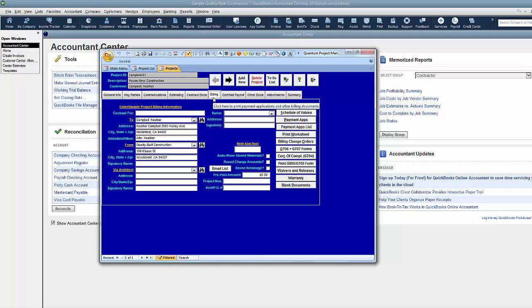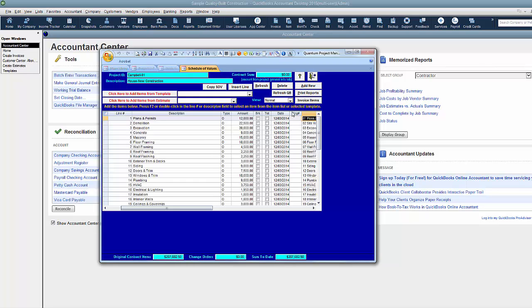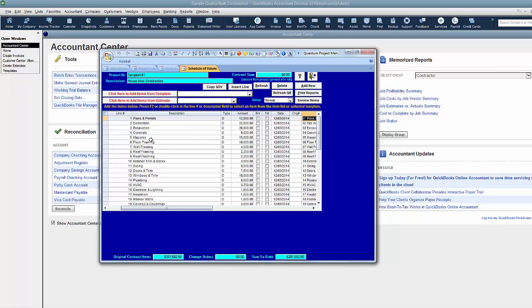Once that's finished your next step is going to be setting up your schedule of values. Schedule of values is a grid. It looks kind of like this. The total check mark is if you wanted to do a subtotal. The BRK is if you wanted to have a page break after a certain line. That just helps you kind of organize and group things. I'm going to keep it fairly simple today and we're just going to have a list of the different types of services that we're going to be providing in this project. So, I've set up my descriptions, my line items. You can have these pre-fill for you which is what I did or you can actually custom set your different line numbers in there depending on what you want them to be. If you have subsections like a 1.1, 1.2, things like that, you can do that. I just had mine go down the list.